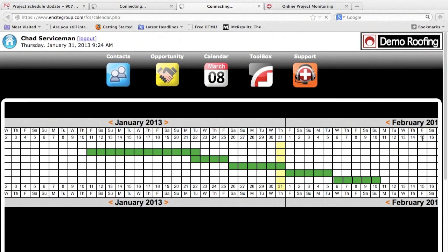The Gantt calendar, I got a couple questions about the Gantt calendar right here. The Gantt calendar is actually populated based upon your project start and finish date. So when you had originally typed those in when I was setting that up, that's what populates this right here. So if I was set up for Thursday right here through Monday, this is where it would automatically populate, assign that color, and then the drag and drop, if you guys do choose to do that, is simply just editing that. Operations is a very simple feature to be able to use.